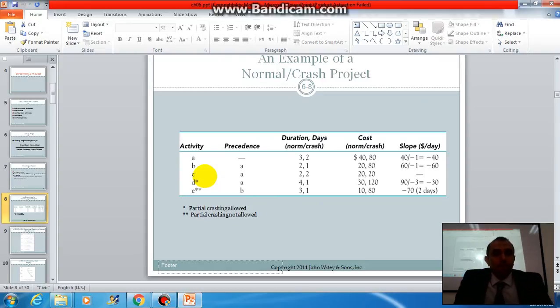Okay, so here, activity A, dramas. Do we have any predecessor for this? No. What's the duration time for A? 3. Not 3.2, it's 3. And if you crash it, I can crash it to 2 days.